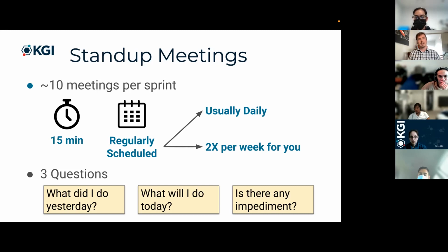Okay. And then the main questions that I love to ask in a meeting like this are: what did I do yesterday, or in this case, since the last meeting? What do I plan on doing today, or in this case, until the next meeting? And then, are there any impediments to me accomplishing that? And so I set up your Scrum docs to ask you to fill those in in a very similar way, right?